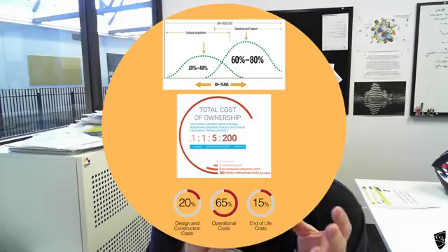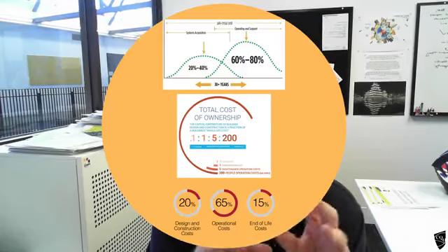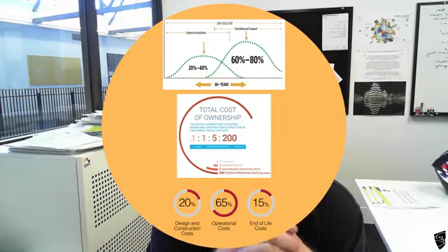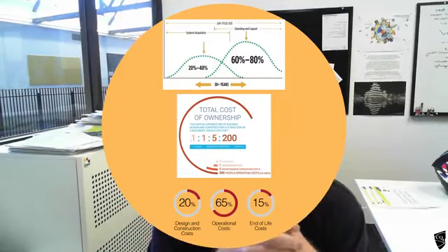The acquisition part of it is the design, planning, feasibility, tendering, construction and handover. And then a little bit of maintenance going on. 20 to 40% absolute maximum. That's a bit high for a building. Buildings will be more around your 20% maximum.